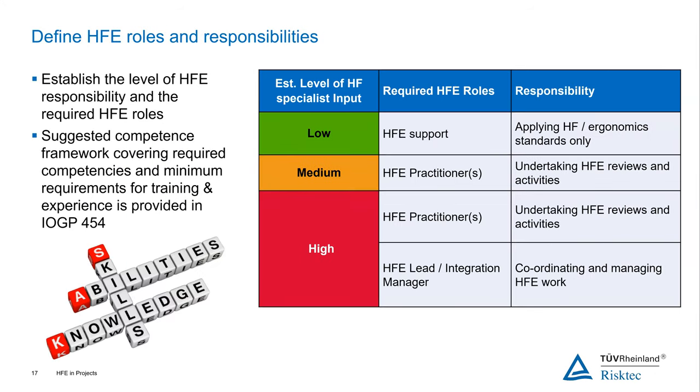So we've gained an idea of what activities we may need to do. We've gained an idea of the level of HFE involvement we need. And then we have to work out for the project, what are the roles and responsibilities that we need? And again, it's all linked to what we've already defined. So if we've got a low level of input that we believe we need, then our HFE roles, you would call them a HFE support role, just applying the ergonomic standards only.